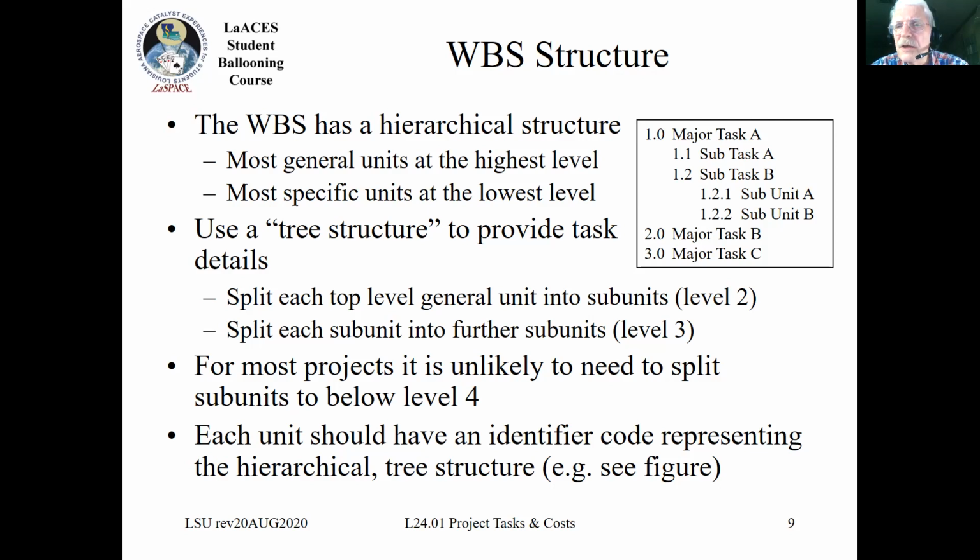This figure goes down to about level 3. For most projects, it's very unlikely that you would need to split subunits below level 4. Level 4 really gets into the nitty-gritty, as you'll see in a second.